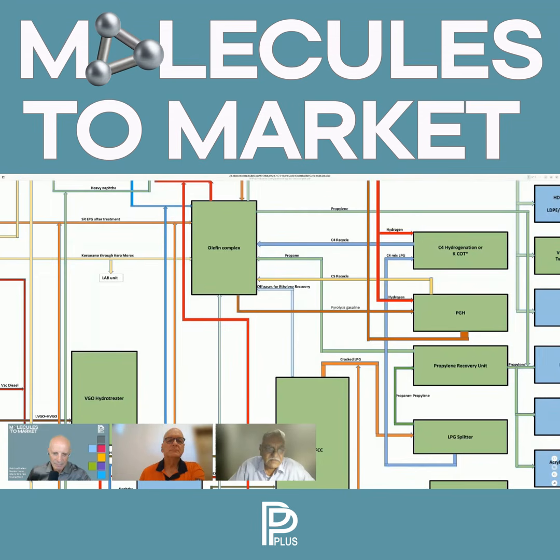So actually in India, our experience has been that this number varies from 22 to 40%. So the risk margin which is built out there can be as high as that, because there is a price reduction clause. Then there are so many risks which the contractor has to take, so this can be a margin, and quite a bit is a delta, which is a penalty to the owner in terms of cost.